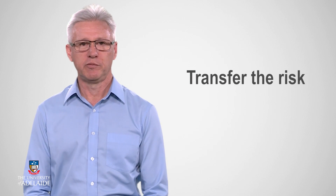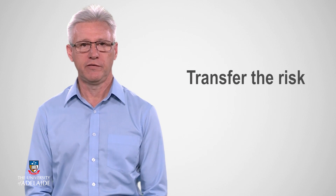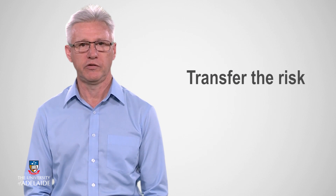The third response option is to transfer the risk. It might be possible for you to transfer an identified risk in full or in part to someone else. As a project manager, if you decide to transfer a risk, you are assigning responsibility of that risk to another party, such as a contractor or agency, who will then become responsible for dealing with it so that it does not impact on your project outcomes.